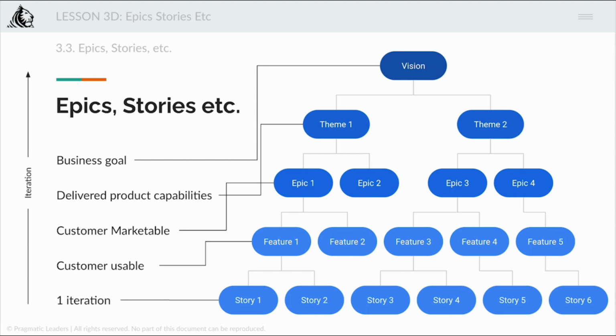Okay, then you will create a few epics around it, and the easiest way to imagine these epics is they are customer marketable. Okay, they are customer marketable. So when you say something to a customer, for example, when you say the mobile phone has a 16 megapixel camera, right? That's a customer marketable feature, right? And that is the level at which an epic stands.